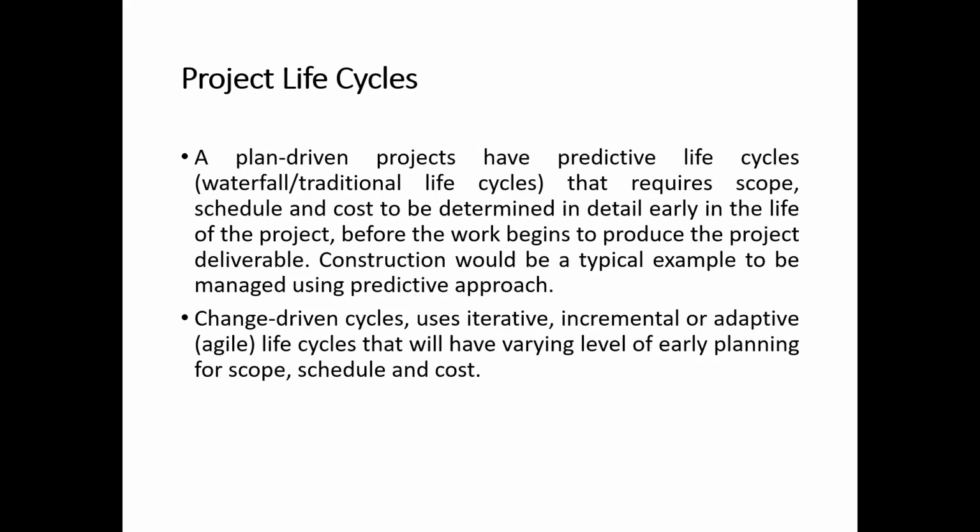Plan-driven projects have a predictive life cycle. The waterfall or traditional life cycle is called the predictive life cycle or plan-driven life cycle, which requires scope, schedule, and cost to be determined in detail in the early phase of the project before the work begins to produce the project deliverables. Construction is a typical example.